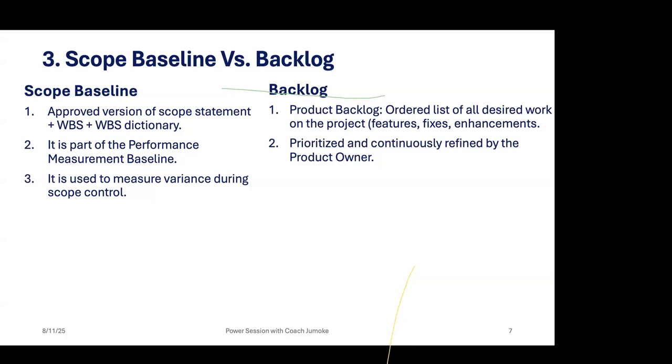The reprioritized product backlog will now be given again to the development team, and then they will pick again what they need to work with. So it's important you know this process. This is how change is managed in adaptive methodology. And scope evolves for backlog.